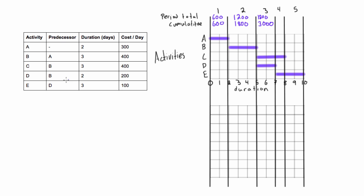In period four we have activities C and E, costing $400 plus $100 per day — $500 total for that one-day period. Adding to the cumulative gives us $3,500. In period five, only one activity is happening at $100 per day for two days, giving a period total of $200, finishing with a total cumulative cost of $3,700.